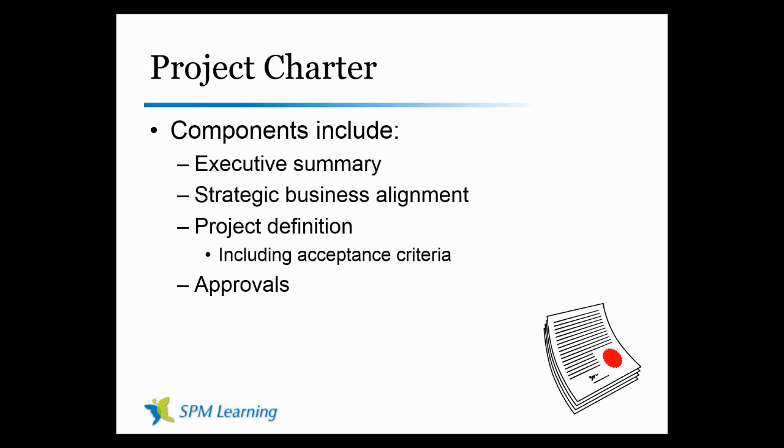In fact, we might not even have the answer to should we do this, yes or no. So we might take our project and divide it down into phases. And that first phase might be some analysis to simply say, should we do this, yes or no? So you want to really look at what that end product looks like when you're done this project. And this project might be the first phase or mini project, sub-project if you will, in multiple projects that are going to end up taking 5, 10 years and end up in a much larger deliverable when you're done.